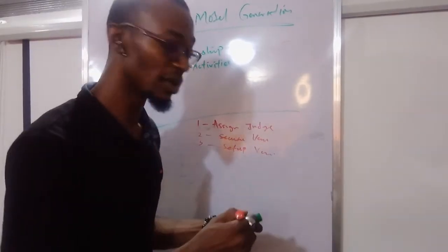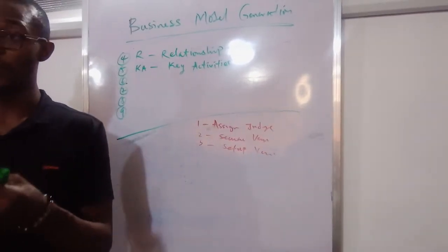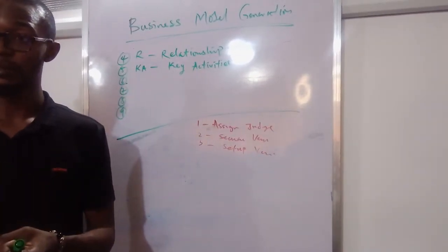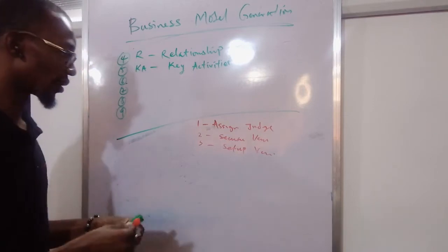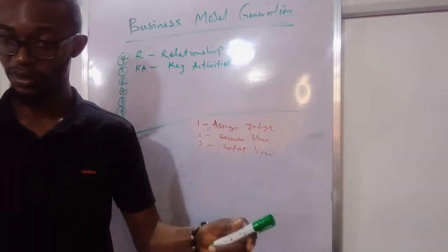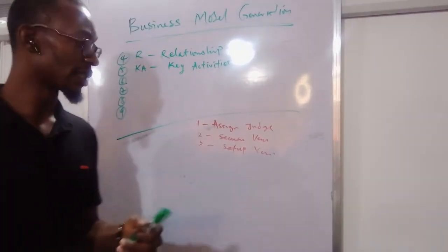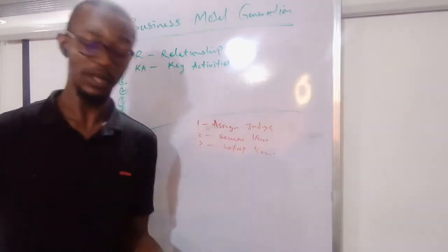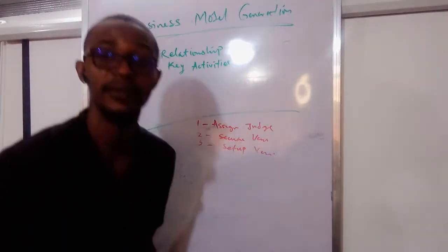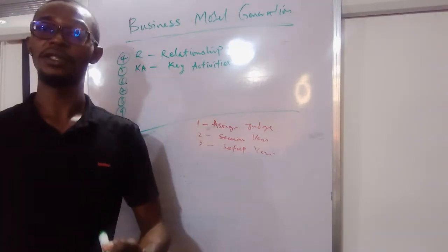one-off activities and recurring activities. Are we together? One-off activities are the ones that you need to get done once. Then recurring activities are the ones that you need to keep doing. And of course, there's a schedule to that. There are activities you need to keep doing daily to the end of the project, the activities you need to keep doing weekly, the activities you need to do monthly.